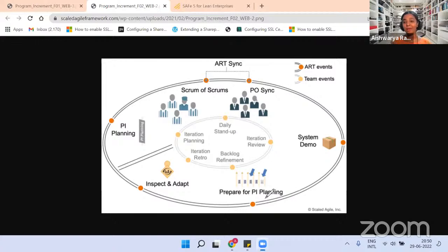And Yusuf was mentioning qualitative analysis and quantitative analysis, right? Quantitative analysis is nothing but bringing the iteration metrics, talking about why these many defects, how can we avoid it, what is the root cause for the problem. We also talk about it. There is nothing wrong in it, right? We also talk about last iteration's improvement items. Did we achieve them or not? Did we achieve the iteration goal or not? Right? And we also see the iteration metrics to identify where it went wrong, what was the problem, why the quality has got reduced. We discuss all these things.